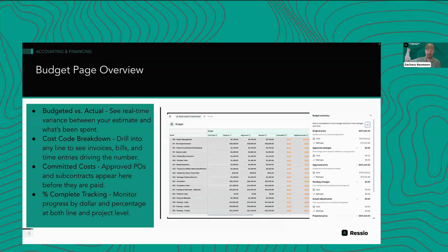If the costs are higher, it's above the budget. If you're trending under budget, you can change the not paid to paid in full, and that will allow you to start seeing those savings if you want to. And it's nice because it gives you that understanding of, hey, we're over here, we're under there. It doesn't prevent any new bills from coming in. It doesn't lock anything down. It is simply a toggle that you can switch between.